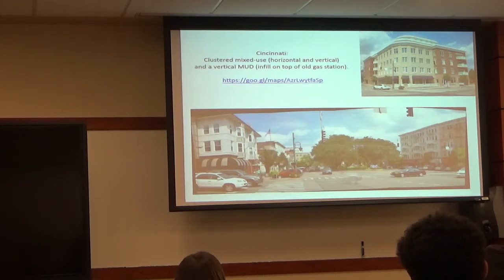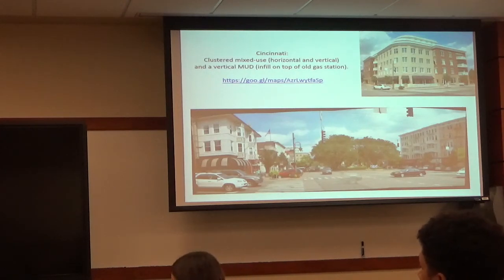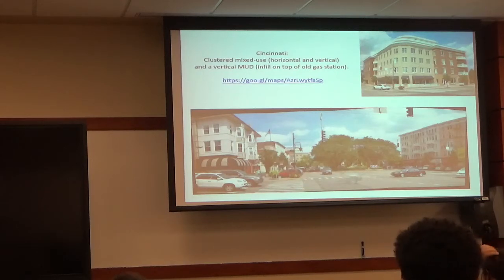They tried to build two floors down, figured out they have issues with groundwater control, so that's the reason why they said the parking garage is now only one level down, and changed the financing. This is a $14.5 million building, and was a failure. This space here supposedly was to become a Starbucks. At that same time, Starbucks decided not to expand into more branches, so they lost that as a retailer.